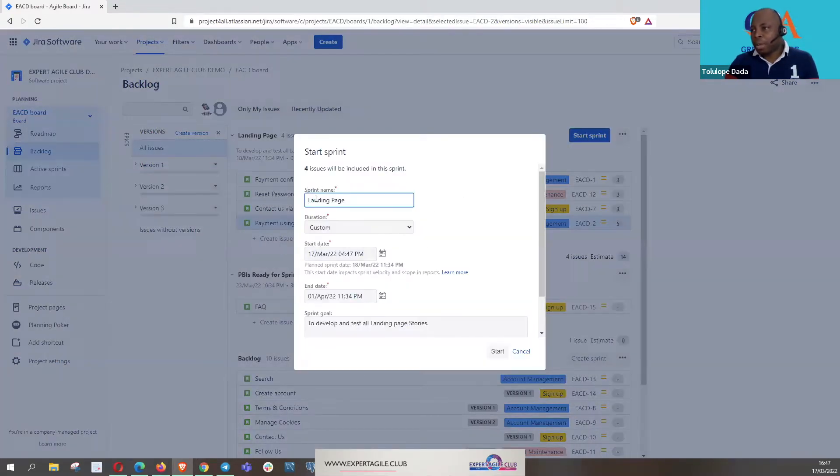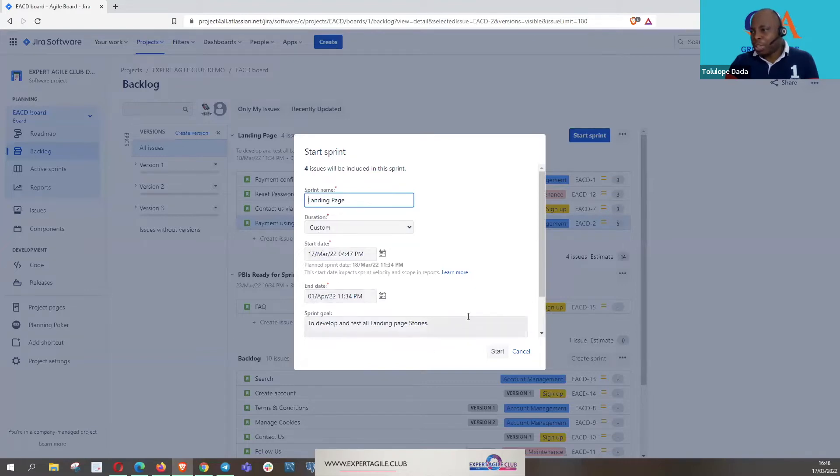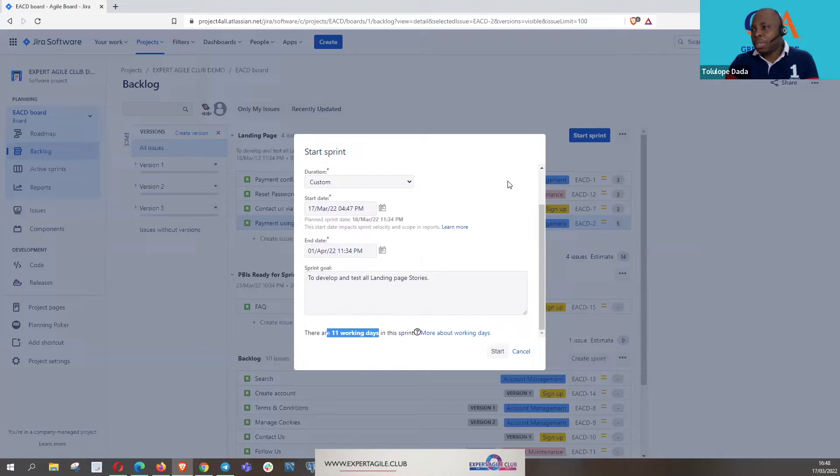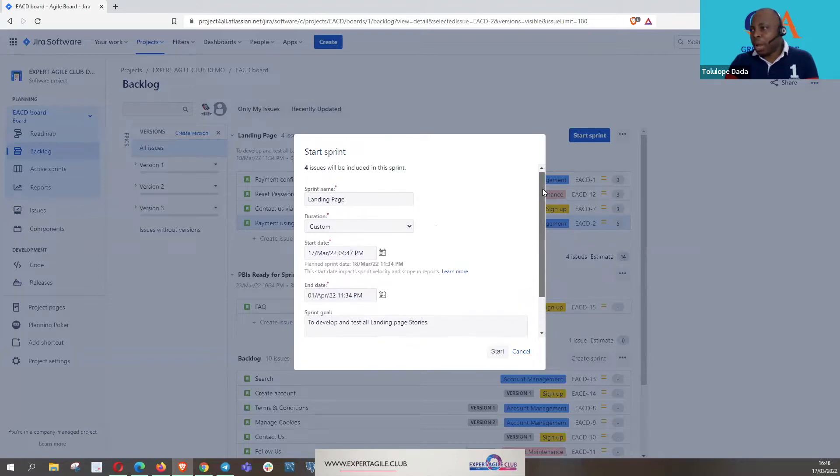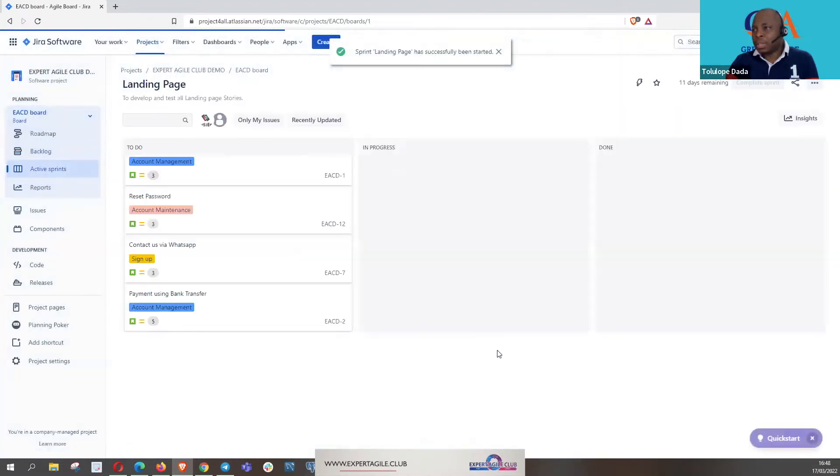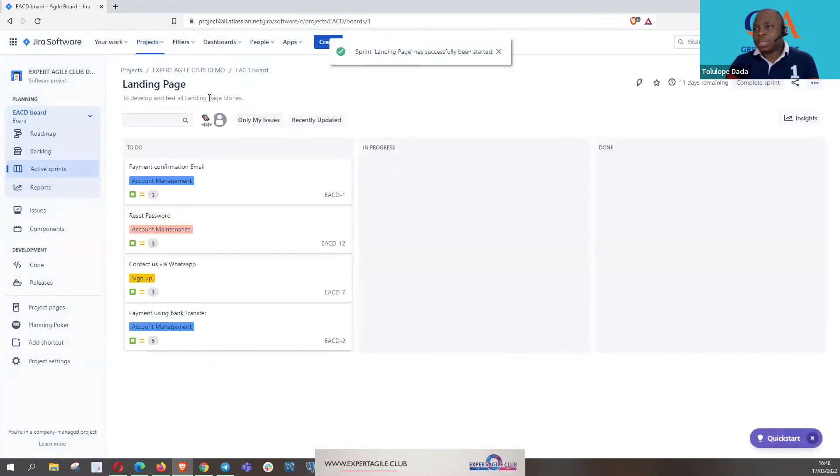We couldn't start our sprint, so we click on this blue button and say start sprint if all the team agree. We have our sprint name, our time from March 17th to April 4th, we have our sprint goal, and it's telling us we have 11 working days. If everybody agrees with that, we just start the sprint.